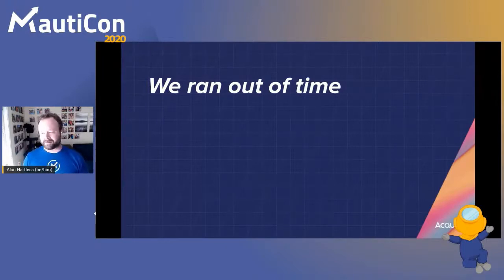And obviously we don't have the test coverage that we should. That was a tech debt we chose to take on in the name of getting to market quicker. And as a result of that, we weren't able to catch these bugs, or things that we broke. And we hit multiple roadblocks along the way because it was a black box to know what we were really getting into as we were moving from years of building on Symfony 2 into Symfony 3.